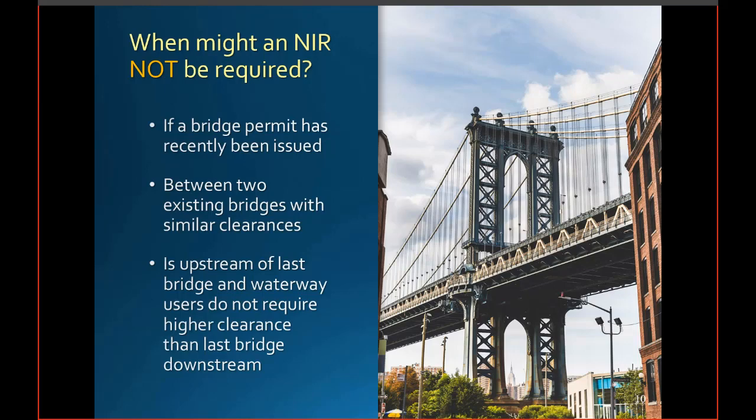Also, if a proposed bridge is between two existing bridges and all will have similar clearances. And maybe when a proposed bridge is upstream of the last bridge on the waterway, and waterway users do not require higher clearance than the last bridge downstream from the proposed bridge. Again, did you follow me with all of those?